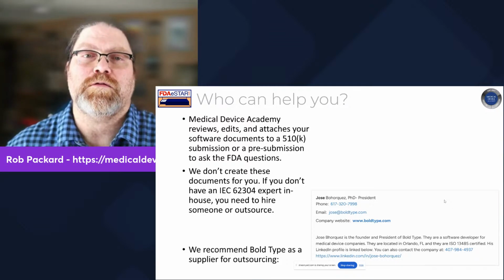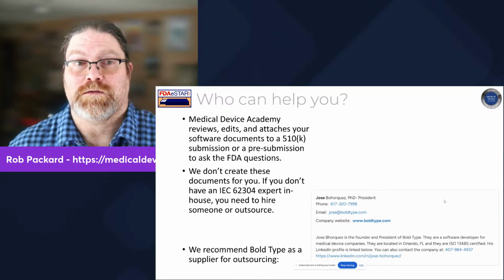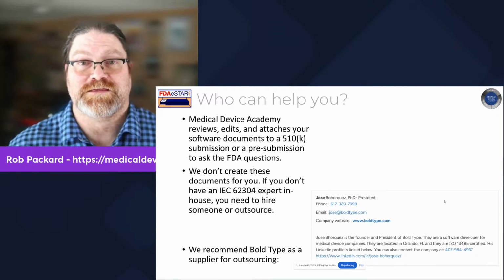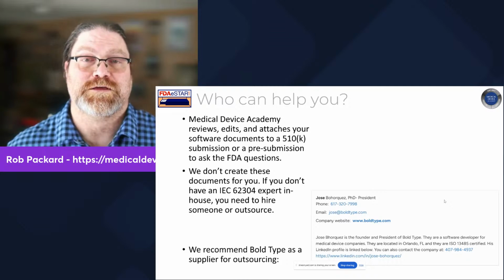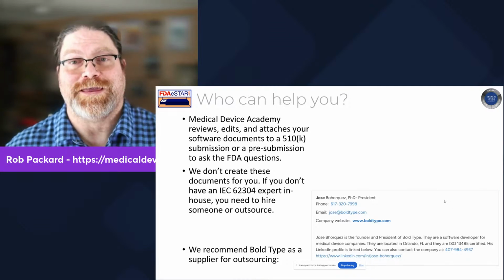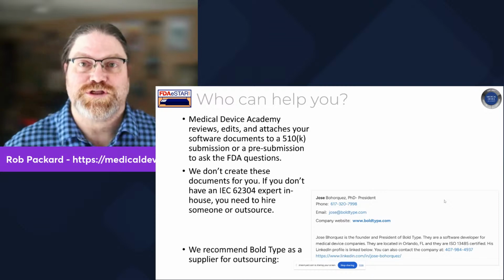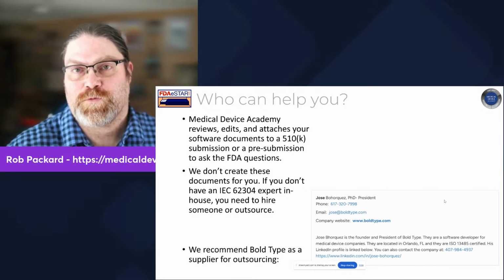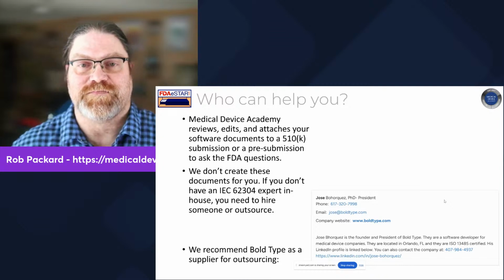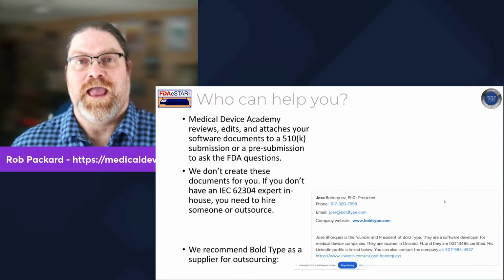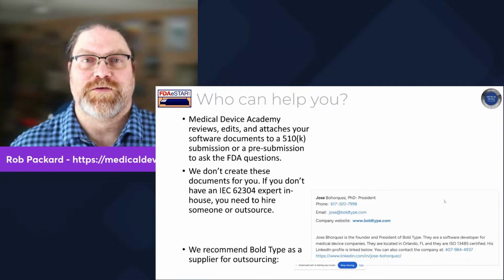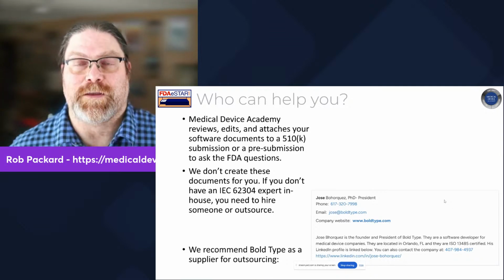No. Well, how long will it take? Well, after you restart the entire project and redesign your software because it doesn't meet any of the regulatory requirements and revalidate it, maybe a year from now we'll be ready to submit. Because these projects usually take somewhere in the order of 4 months just to come up with a plan and submit it to the FDA and get their feedback on it. And then 4 more months to actually execute the plan, and then 4 more months of review. So a year from now, maybe.